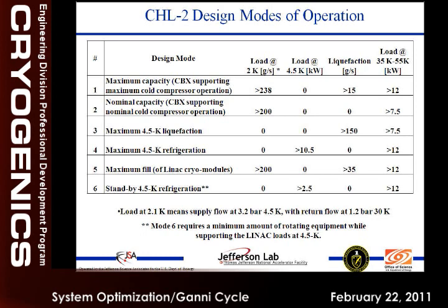And this is when we have to maintain at 4K as a maintenance operation, when the LINAC needs to be at 4K. We have to do maintenance on the system. So these are the various modes the system is going to see. And these are all defined upfront because it will see maximum refrigeration during pump down.